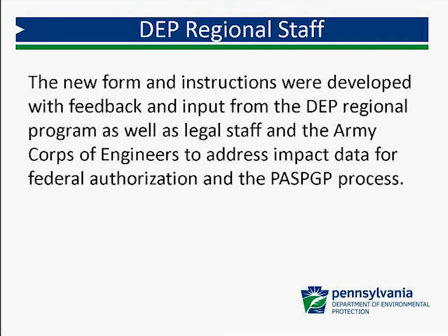One thing that I want to add is under permit decision guarantee, all the GPs except GP 11 are lumped into one process for review, which means right now there is a bifurcated review process for completeness and eligibility. That process delayed permit authorizations because our 105 regulations allow for 60 days to address potential deficiencies.